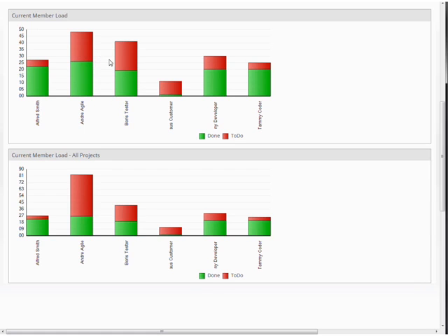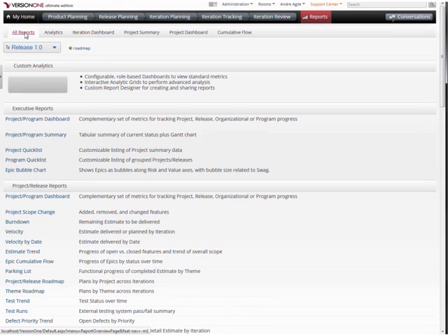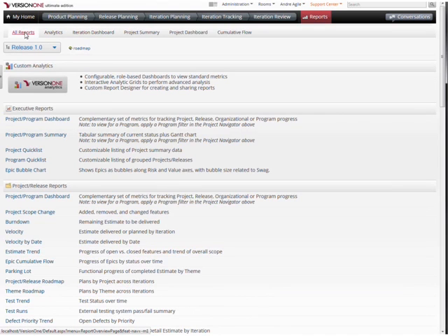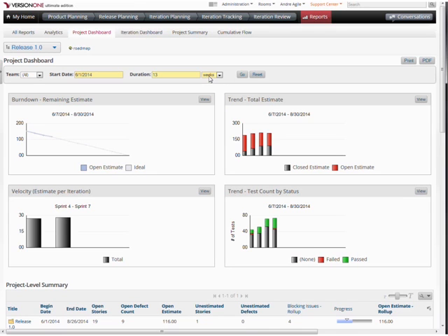And if you see that this is not happening, the bottom chart is there to complement the top chart. So the top chart shows us what's going on in this sprint. The bottom chart shows us across the entire system. If you have folks that are working across multiple projects, you may notice that, for instance, the third one over is not nearly as high as the rest of them for done. But if you look down, you can see, oh, this individual is working on more than one thing. Is there any way we can rearrange work, maybe pull someone in to help in a given area in order to meet the commitments?